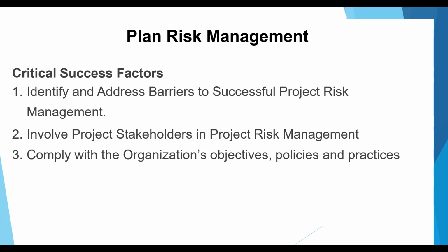So the critical success factors for the plan risk management process are: number one, identify and address barriers to successful project risk management, which means the risk management plan will not deliver its value unless project risk management is carried out as an integral part of the project. So it should be very clear that your project risk management process should be an integral part of your project. And the corresponding activities should be built into the project work breakdown structure, and included in the corresponding schedule, budget, and work assignment documents.